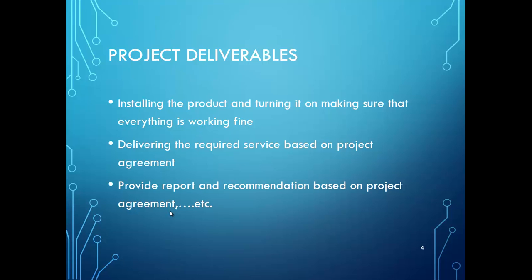The deliverables will include delivering the physical product and or the required service based on the project agreement. In most IT projects, this includes installing, configuring, and testing the product to make sure it is working as intended, then training the company's employees to use the new product, whether it's software, hardware, or a service. With delivering the product, a report will be provided that might include user manuals and technical manuals.